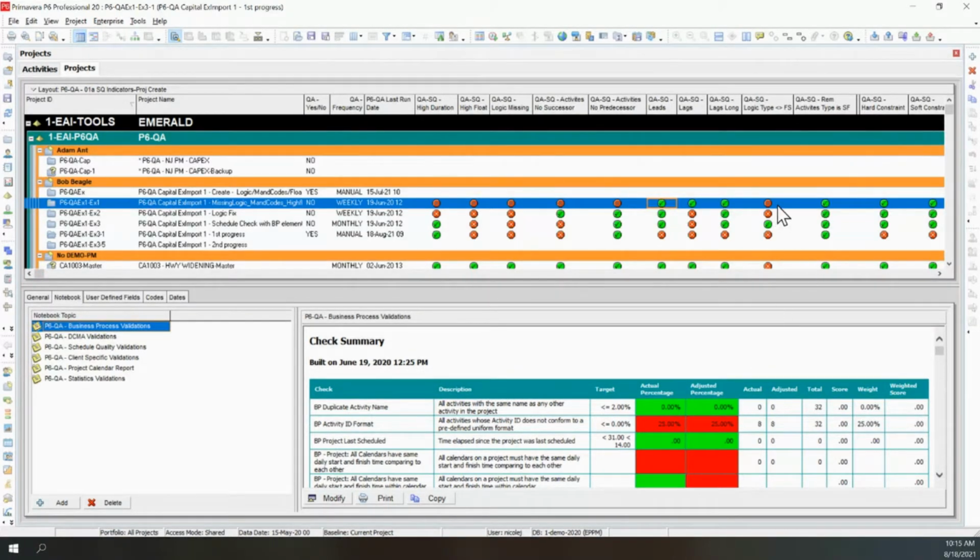Now, let's touch on the next one. The simplest type of schedule to work with is the one that has the bulk of the logic as finish to start. So we want that kind of schedule. Now, some of you might say, well, that's crazy, it's impossible, because it's going to make too many activities. Well, I'm a big believer that more activities that are easy to update is actually a better thing than fewer activities that are very frustrating to update, and very frustrating to explain to people when you're supposed to get started. That's really what this is driving at.